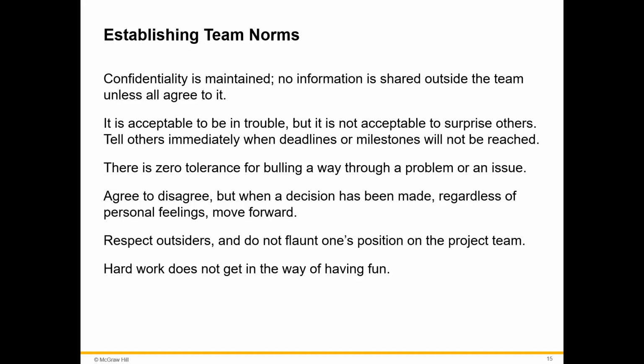So tell others immediately when deadlines or milestones will not be reached. And hopefully, the idea here is that if it happens once or twice, I can understand what's going on. It's not a huge problem. But if it happens frequently, to the point where you're constantly late, then it's not acceptable. Surprising somebody else with your lateness, with not meeting milestones, will not be taken very easily.